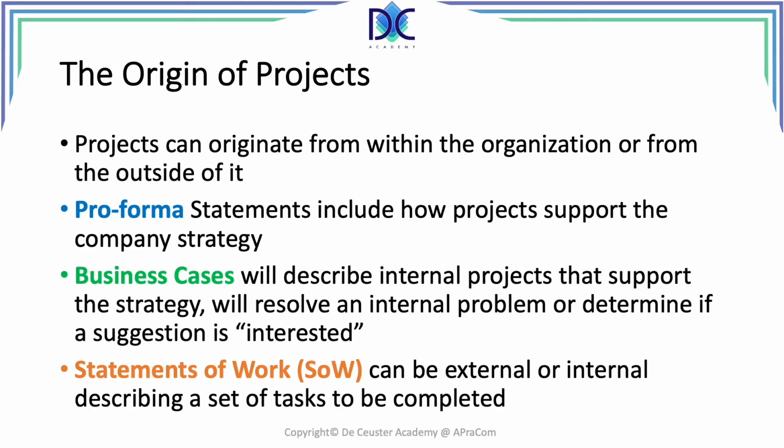Internal projects are mostly defined in business cases where the different programs or projects are evaluated, taking into account different parameters like risk and profitability. Financial parameters that are typically used here are the net present value and the internal rate of return. An example of a business case could be the creation of a new car like the Lexus, to create a new website or algorithm, or improving the efficiency of production or business processes. The business case will evaluate if it complies with the strategy and find out if it's a good solution to